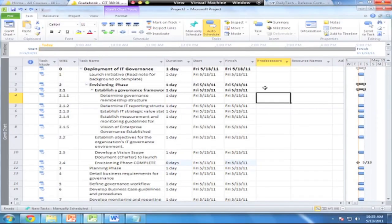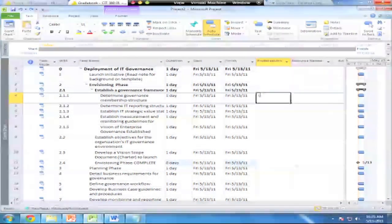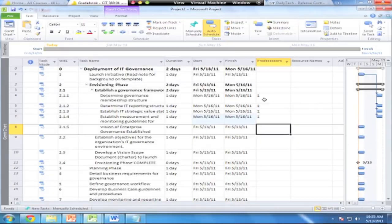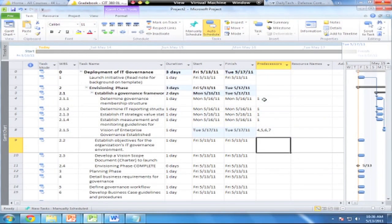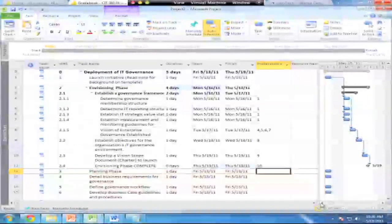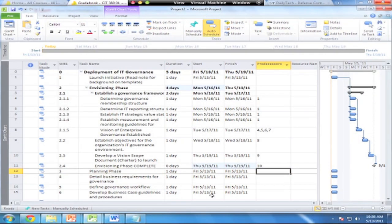Now let's go set up our predecessors. We're going to assign a predecessor of 1 to the first four tasks, then tasks 4, 5, 6, and 7 for the next one, followed by 8, 9, and 10. Now you'll see the Gantt chart view has updated to show how those tasks flow one right into the other in a waterfall kind of model. That takes care of predecessors. Next, we need to deal with resources.